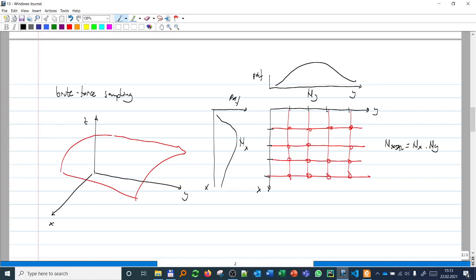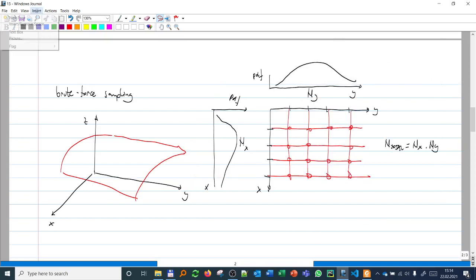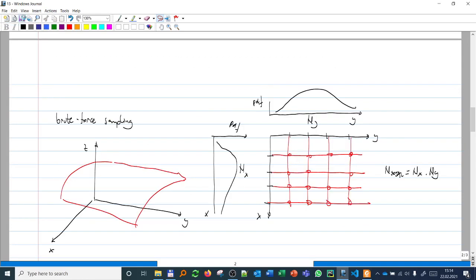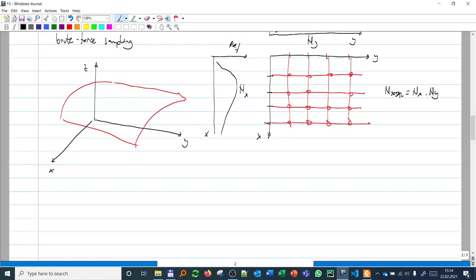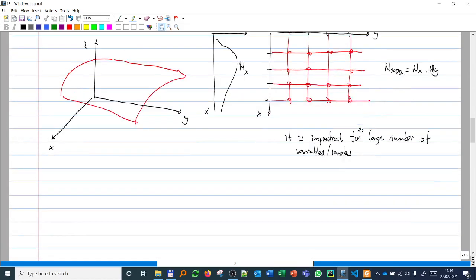So rather than a uniform grid, we actually need to sample more from regions of higher probability for both x and y. The other problem with brute force is that it is impractical for a large number of variables. If we have two variables with 1000 samples each, we need one million evaluations. With 10 variables and only 10 samples each, that is 10 to the power of 10 evaluations.